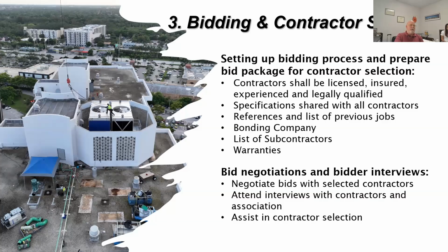So you really need to make sure that your bidders list is made up of qualified bidders, ones that have done this job in the past, have the resources, have the back office support, understand things. For example, in certain areas in Miami, we can't get a crane in. We have to do a helicopter lift because there's nowhere to place a crane, and everything that's involved in that. We have to have everybody from the FAA to the Coast Guard to local government involved in getting all of the clearances that we need to be able to do those lifts.